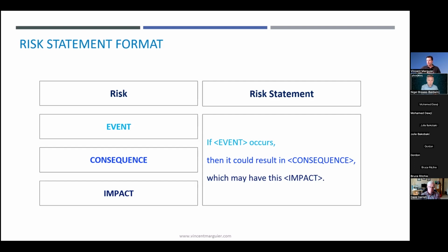Some examples of risk statements: if a person swims too far away from the beach, they may be bitten by a shark, which may lead to serious injury or death. If event, then consequence, which may have an impact.